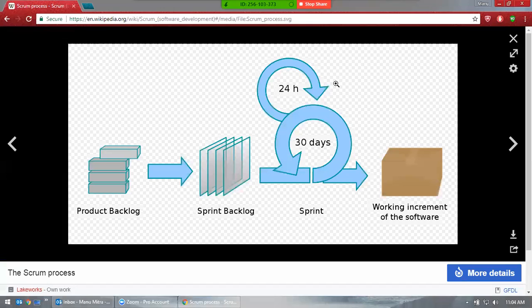Here, you didn't see any user stories, right? The product backlog is a large chunk of work. Now you need to divide it into sprints. That means you decide which priority user story has to go into which sprint. That's what you divide in the sprint backlog. And in the sprint backlog, you have user stories. Let's say each sprint backlog has 10 user stories, and each user story gives some information about a particular application, a particular page. Now, a user story is the technical information.